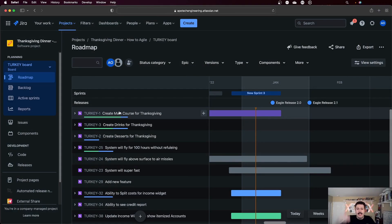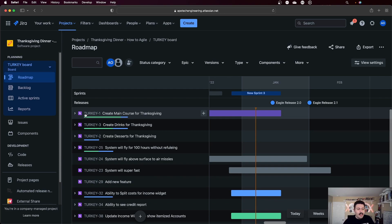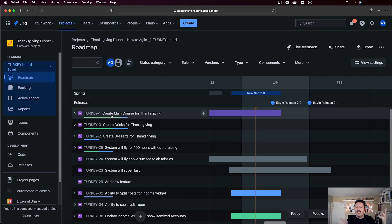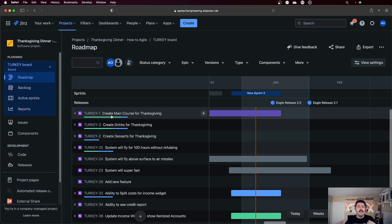So the first thing that I want to tell you is the basic roadmap is going to work from the epic down. So that means that if you're creating issues, the basic roadmap is actually going to let you create epics, stories, tasks, and bugs, nothing else. If you're a team that is using issue types above the epics, like an initiative or a theme, that's not going to work here. So that's limitation number one. Also, if you're using subtasks, that's also not going to work. So that's limitation number two.